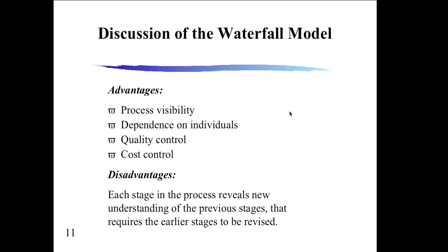And cost control. If we've got it all broken out, we can say, you have a budget, and you have a budget, and you have a budget. The problem a lot of companies have is they wait too long to break it all out, and they've gone through half of their budget before they realize what they actually need the resources for. So they spend the first couple of months spending money, and then they realize they don't have enough money left. Uh-oh, we need more investors. After they've broken out all the phases and looked at it, they go, oh, it's going to cost a lot more than we expected. Why did we spend all that money sending everybody to Hawaii for a group bonding experience in the beginning, when none of these people are ever even going to work on this team project at all? So we wasted a bunch of money.